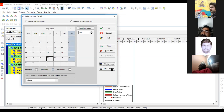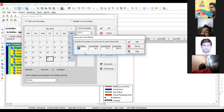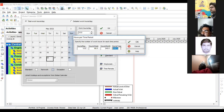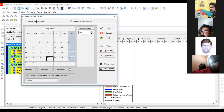Click Time Periods — this is important for Primavera to calculate man-hours when resources are applied to activities. Enter accurate values: 10 hours per day, working 6 days per week equals 60 hours per week. Four weeks per month equals 240 hours per month. Twelve months per year gives 2,880 hours per year. Click OK when done.